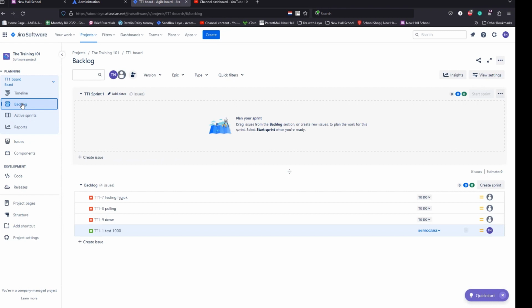So when you go to the backlog for your Scrum project, you would have the list of all the items that you're planning to prioritize within your teams when you're having your Scrum meetings, and then the items are going to be prioritized, and then you move them into the sprint. In most organizations, they do 2 weeks iteration. Some would do 3, completely entirely up to the company or how your team is set up. In this training, I'm going to be doing a 2 weeks iteration.